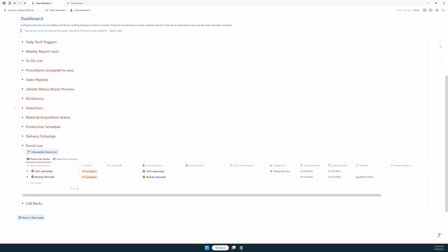In the punch list area of the dashboard, the objective here is to manage the things that you're not able to complete on an installation because you're either short something that you need to have manufactured and gotten ready for you to take to the job site the next trip, or you didn't complete all the things that you intended to complete, and so this is the reminder, or in case someone else has to complete the project for you. And it should be room specific.